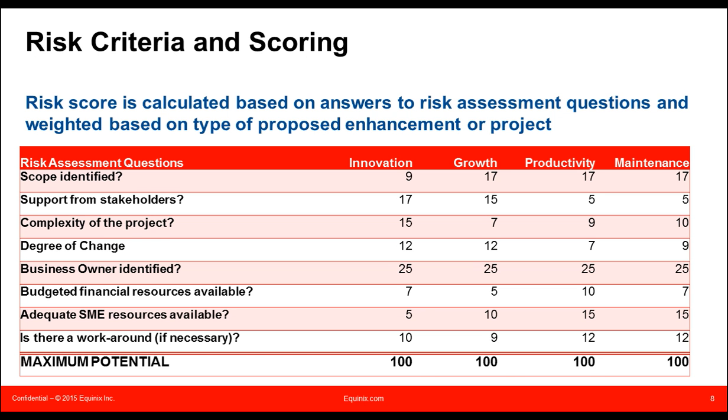Of course, we don't rely 100% on that forced ranking. There are things that we have to take into account, like, is this a SOX requirement, or do we have to do this in some way to deliver more value to the business? Even if it's not from a quantifiable perspective, we know this is a must-have that we have to do in order for us to continue to stay operational. So those things we're always going to prioritize on top of everything else.